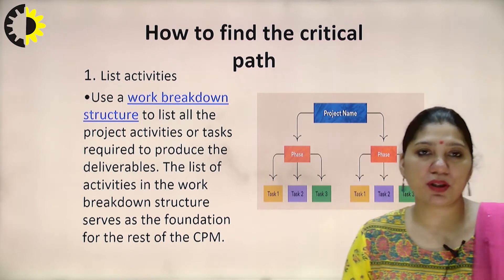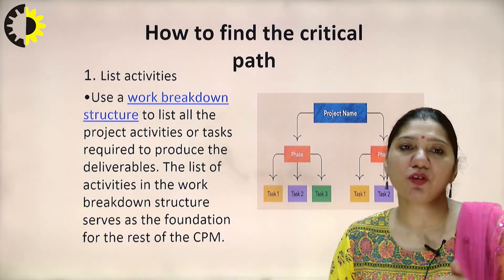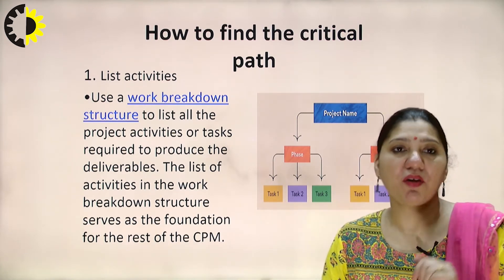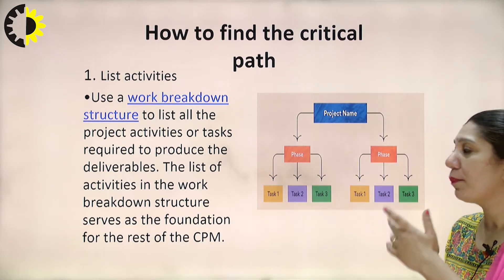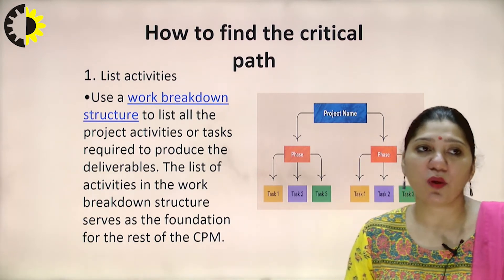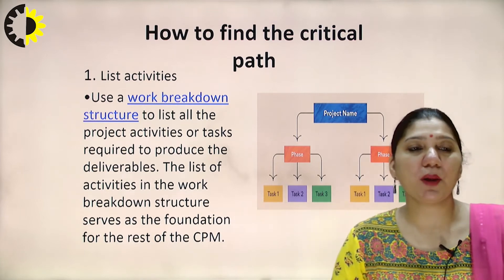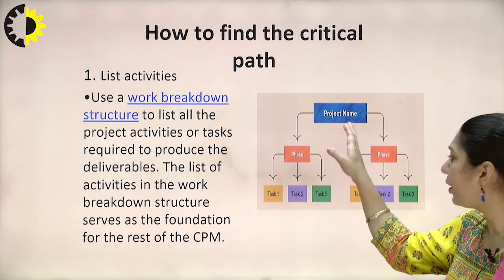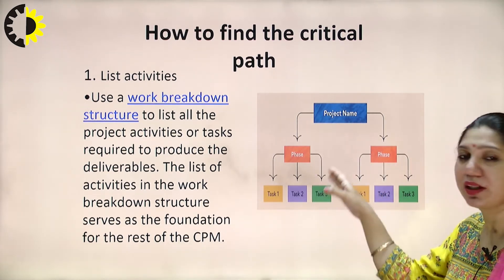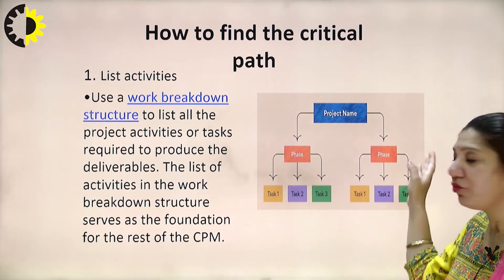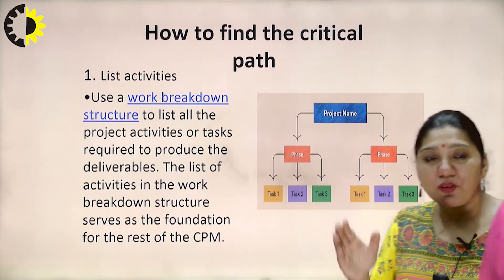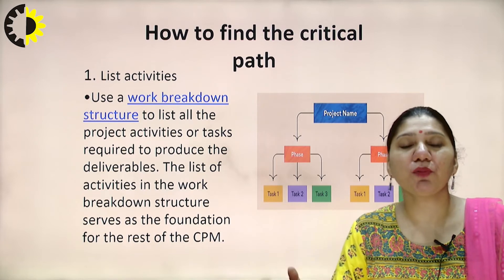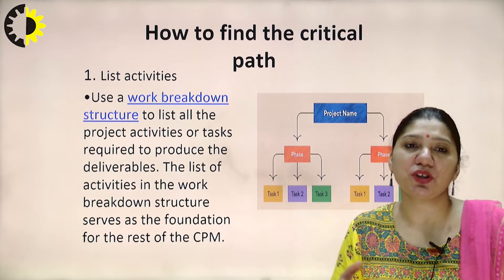How can we identify the critical path? After analysis of your project, you have to break your project into different modules — this is called the Work Breakdown Structure. It says to list all project activities or tasks required to produce the deliverables. The WBS serves as the foundation for the rest of the CPM. In the diagrammatic representation, we have the project name, different phases, and within each phase certain tasks — task 1, task 2, task 3. If you have a big project broken into small modules, the complexity gets reduced and at the end you can integrate the project completely.